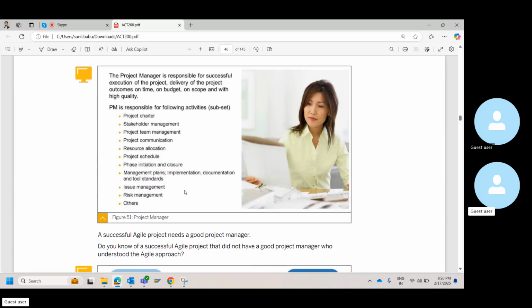How it usually works is you will have a senior project manager or maybe a junior project manager along with you, or a project coordinator. You will lead the show, you will do the deliverables, you take the Scrum call, you will drive the Scrum call, and you will have your subordinate with you from the PMO team who will help you throughout the documentation, recording the CTAs, doing an MOM, preparing PPTs. So that's how it generally is. There's no concept of Scrum Master.